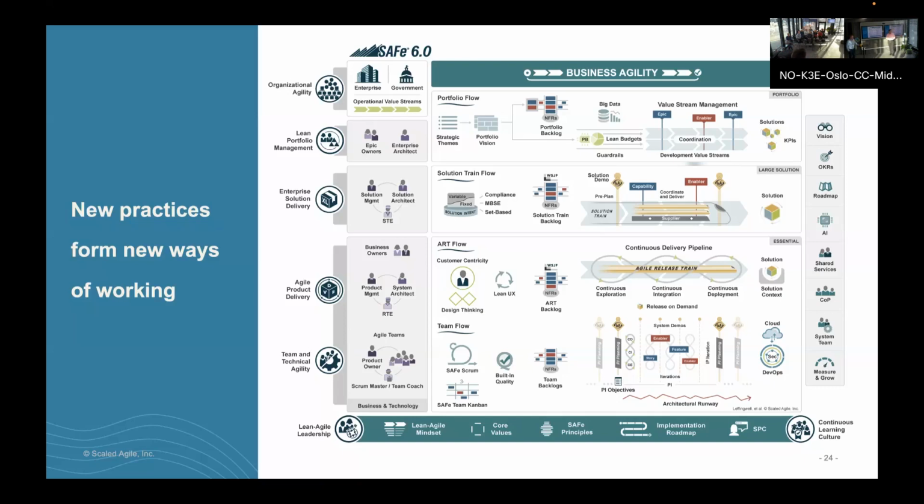Either you go back to the platform teams and see if you can branch your platform teams, because when you split into platform teams, then who is responsible for what? Then you need to split your platform in 2. You can take a security part, or a container part, but you cannot say, I have one platform team for containers, I will split my container team into 2, because it will not work. If you have 2 accountable teams, then nobody is accountable at the end. So you must have one team.